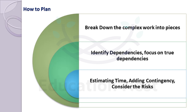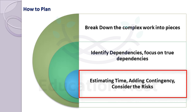This is a focus point because in expert project management, the project managers who are mostly successful do all these things methodologically — they are organized. When a project comes, they will try to break down the complex work into pieces because simple tracking makes your life easy as a project manager. Then identify the dependencies and constraints and estimate how long each piece will take. Estimation plays a very major role because it tells you how much time you are going to take, how much cost is involved, and whether you will be within budget.